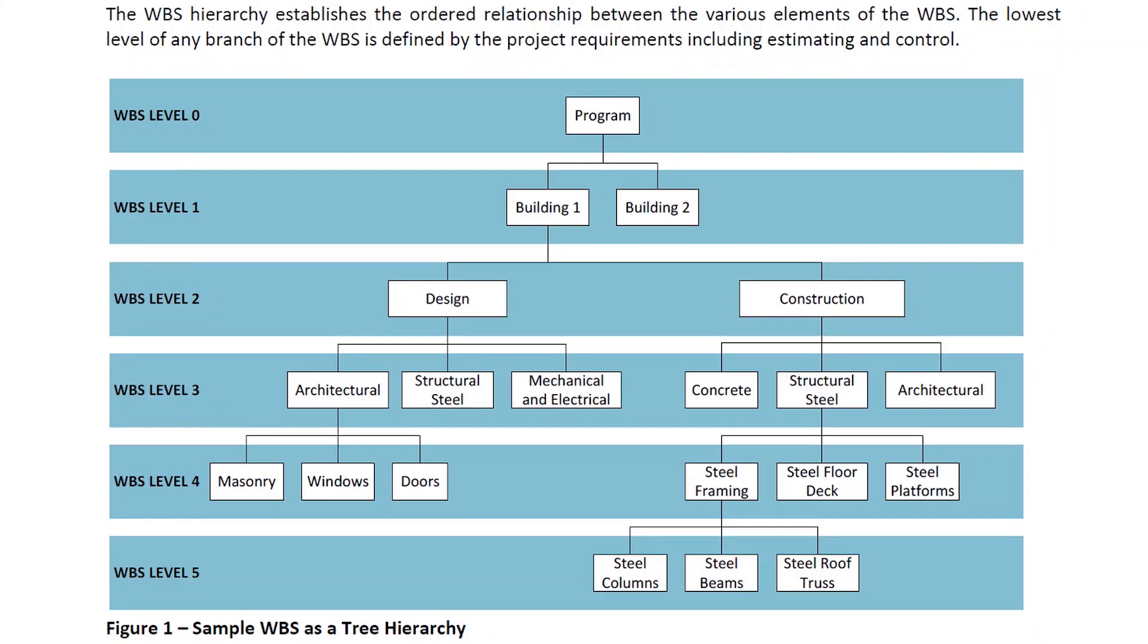So a couple things we want to highlight about this image here. Notice on the left we have the different levels of the WBS. Okay, so at the very top we have level zero and that is here they're saying that's the program that can also be the project. Okay, so the project is always at level zero.